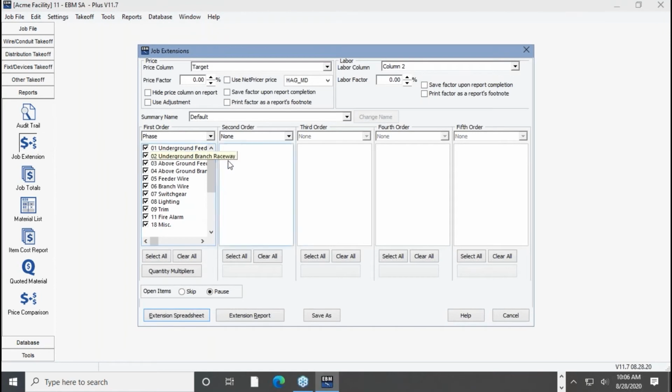This is kind of an interesting one I ran across just over the last couple of weeks. I've been working with a customer who uses the program in Barbados, of all places. And basically, he needs to add a 100% factor to the U.S. prices, because that's what it ends up costing him by the time he pays duties and prices in his area. So he puts a 100% factor there.